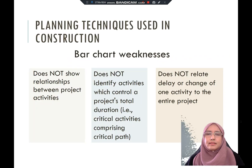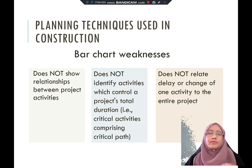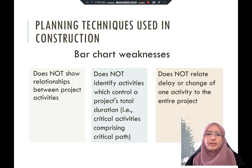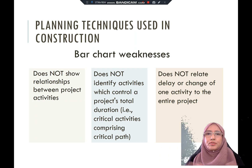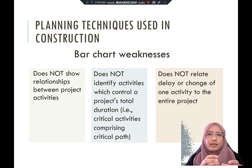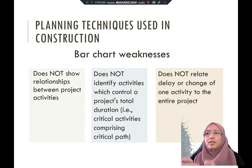Although the bar chart is simple, it has weaknesses. The first weakness is it does not show the relationship between project activities — from activity A to activity B, there is no shown relationship. The second weakness is it is unable to determine the critical path or critical activities, which determine the project duration. It also does not relate delays or changes of one activity to the entire project — if activity A is delayed, it cannot show how that affects other activities.